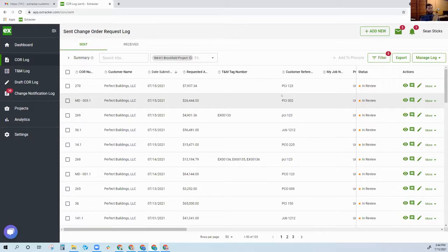And the one thing that maybe I didn't highlight, the reason why change orders are really important for you as a subcontractor is because a change order means you're being the bank. You're lending your money to the project during that time. And so you need to recoup that money back as quickly as possible. One, because you're a small entity and that cash flow is very important to your business. But also it's just the frustration and headache so that you don't have to stress about it. So being able to create this document, submit it appropriately to the general contractor, updating all your information while everyone else knows that too, becomes extremely vital for a company. And so that's essentially the change order.